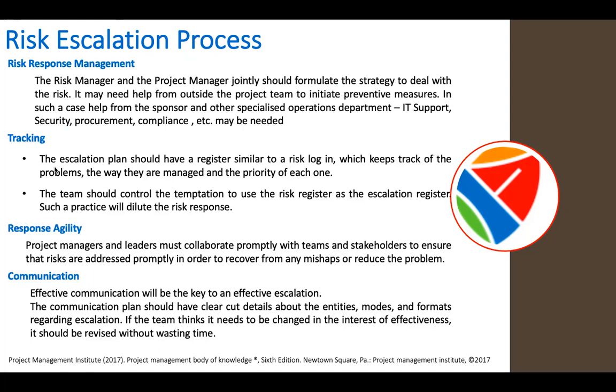Let's talk about the risk escalation process. In risk response management, the risk manager and the project manager jointly formulate the strategy to deal with the risk. It may need help from outside the project team to initiate preventive measures. In such cases, help from the sponsor and other specialized operations departments like IT support, security, procurement, and compliance may be needed.